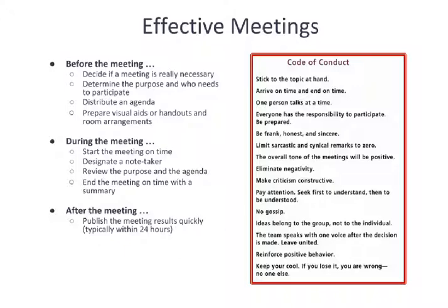The reason for this is we all at times are ineffective as listeners. In a meeting, discussion is happening, but that doesn't mean everybody heard the same thing. People can zone out for a bit, they can become distracted, they might miss something that is said, and therefore you need to have published meeting minutes that communicate in a very concise way what was discussed and what was decided in that meeting so that everybody remains aligned.